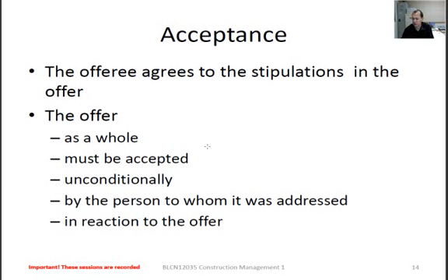All right, so onto this slide, the acceptance. In order for it to be a valid acceptance, non-negotiated, it needs to be the whole package. Unconditional, no conditions, or unqualified, and of course the person that it was addressed to must obviously be the person that's going to accept it.